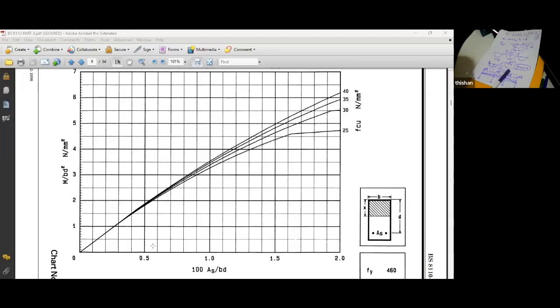So the cost of hiring is very low for them. They have already depreciated those plants, machinery and equipment on their balance sheet, so basically it's coming almost free of charge for them. Whereas when you are finding the rate, all those are included. Contractors can also offer pretty good rates, especially because they are getting everything without VAT.